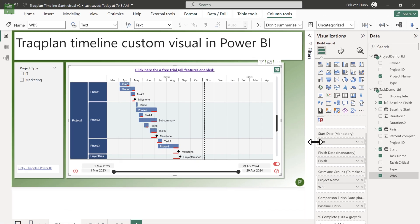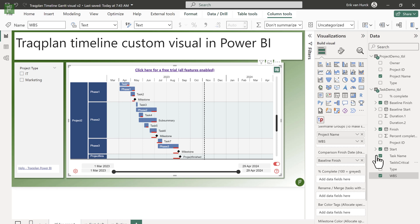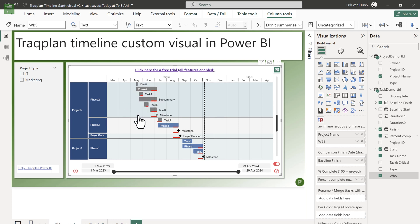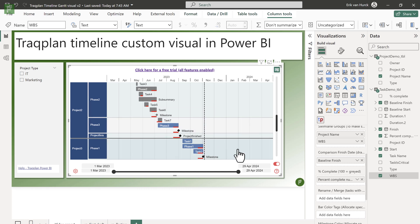Then there's, of course, other things that you can add, such as the percent complete. And if a project task or any task or milestone is completed, it will show up gray. It doesn't show a partial completion, but that is, of course, not a really big issue, I would say.